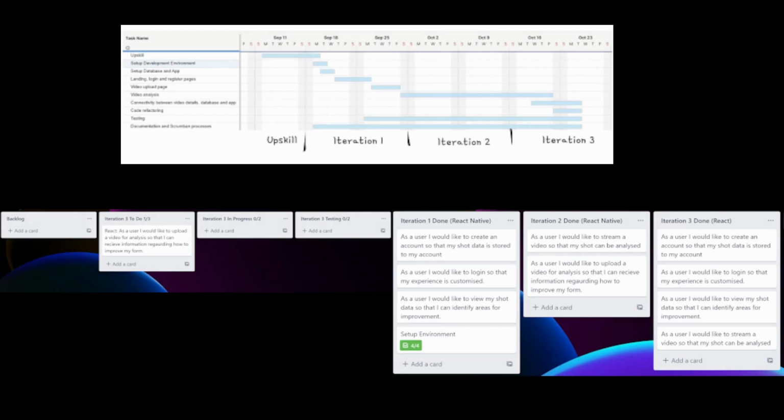The development process that I followed was Scrumban. This involves utilizing the visualization of workflow and limitation of work in progress from Kanban, and introduces weekly reviews and retrospective meetings provided by Scrum. This model also does not require the definitive roles set by Scrum to operate efficiently, a crucial aspect for an individual developed project such as this. This process follows iterations where I split my development into 3 main sections.